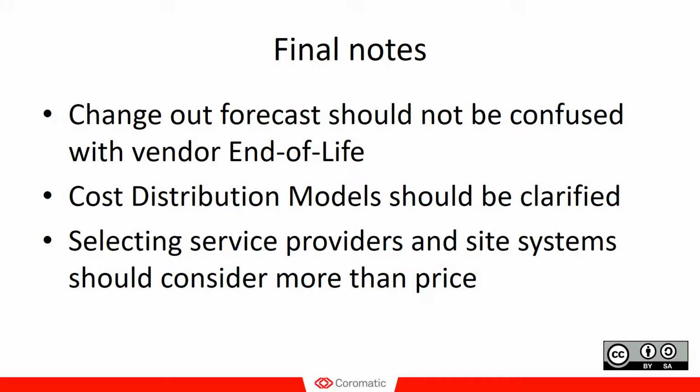Cost distribution models need to be clarified, and the cost distribution models, what was that? Well, that is when you have costs, they may be internally accrued based on work efforts or otherwise, or they may be externally invoiced, but it's costs that need to be shared across several systems or sites, or do not exactly belong to one clean single area.